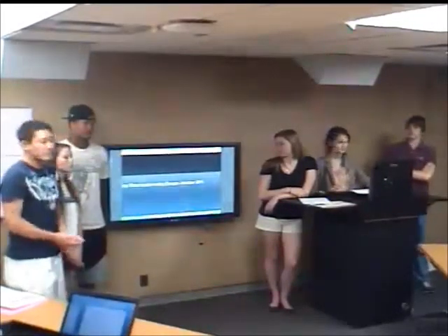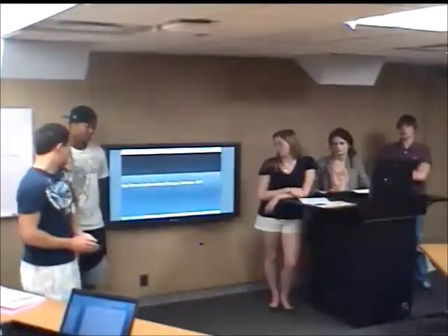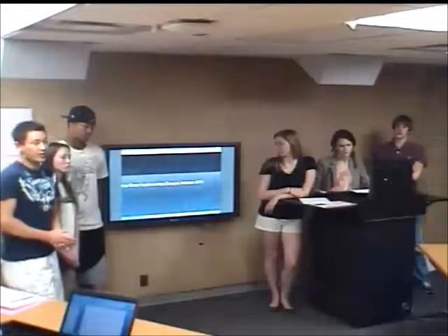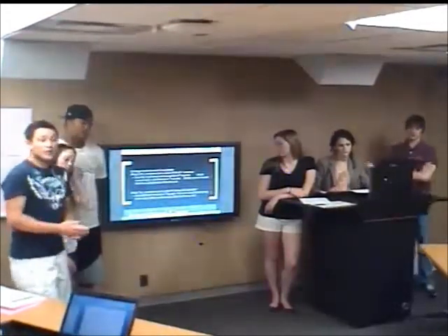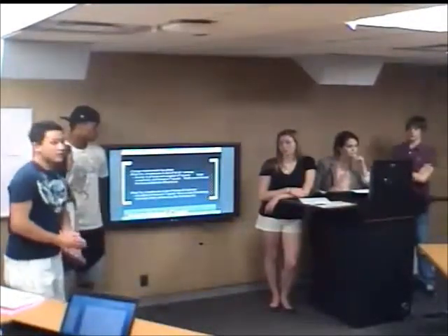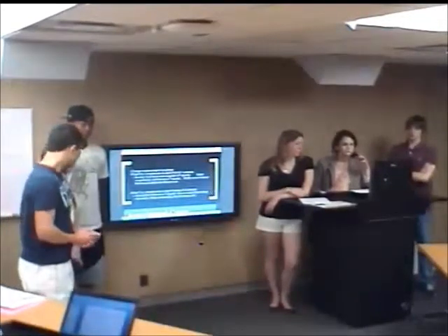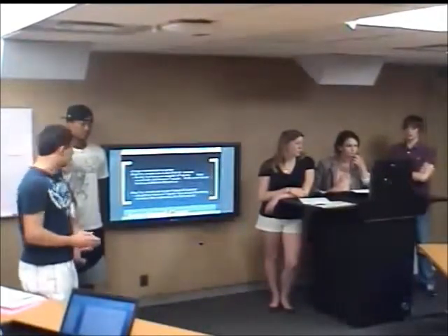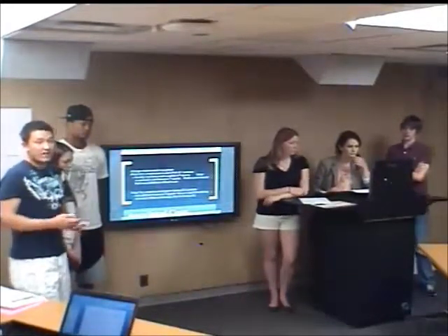Okay, so step 3 is going to be implementing the changes that we talked about in step 2. This is probably going to occur around late June 2011. We want to implement the changes in 2 phases. Phase 1 is going to be complete prior to the start of fall 2011 semester. And what we're going to be doing in phase 1 is mainly revamping the visual layout as well as navigation